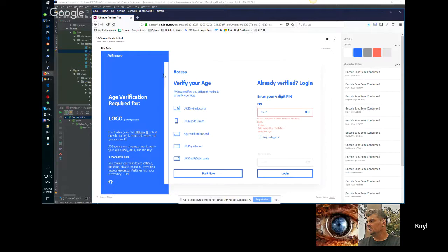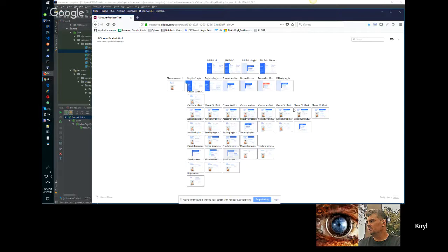That is about layout. If we speak about functional testing, it will be very fast because on each screen we have only about 1 or 2 fields and about 1 or 2 buttons which will be clicked. So one checkbox and one, for example, radio box and so on. The test will be the same: open the page, find the input field, type in the PIN code, click the login button, and verify the result. So, for example, if every page has 10 functionalities, let's say that's the maximum, and you have 40 pages to include with functionality and UI testing.